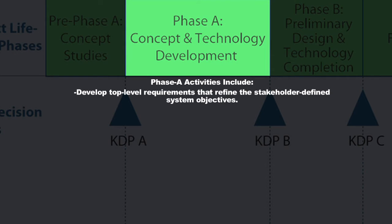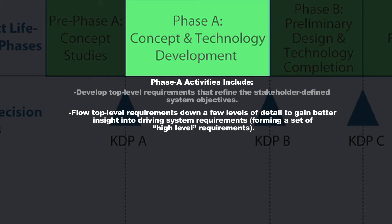You're going to flow these top-level requirements down a few more levels of detail in Phase A — we call those a high-level set of requirements — maybe two more levels of detail, providing more specificity along the way. You're going to figure out what your driving system requirements are: the requirements that will really cause your designers to stretch to meet them, perhaps requiring a new technology or a new design technique for a satellite. You want to understand which requirements will be key for meeting objectives and pushing the design forward.